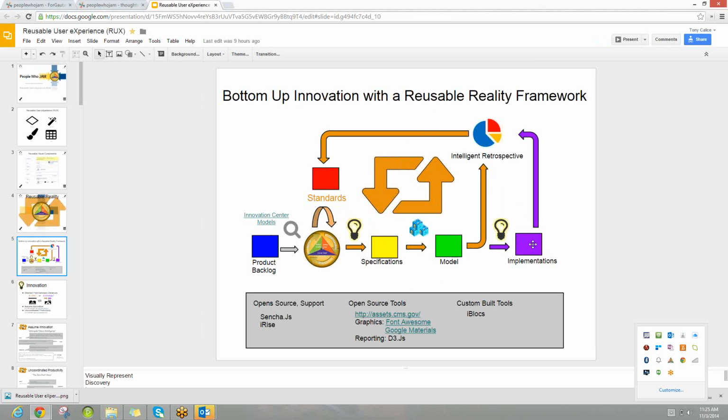So we might have 4 reporting ideas. They might all be spectacular too. We don't know, but we'll need to compare them. After we at least implement 2, we can look between the 2 of them. And in Agile, we always ask at the end of a sprint these 2 questions, which we will ask once every 2 weeks. Based on the things that we implemented, what are the things that we like and we want more of? What are the things that we don't like and we want less of?